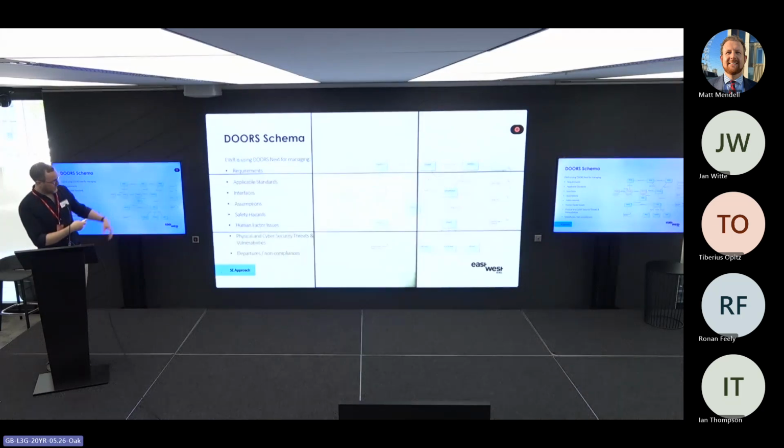And so part of the reason why it is important for me that we have the hazard stuff captured in DOORS is that we can begin to either refer to those standards and say, well, that's the standard that covers the hazard, or if it has a specific safety mitigation, we'll turn that into a requirement, and we'll put that in part of our requirement set that says, put handrails on all the stairs, and then through the V&V process, you'll be able to evidence that requirement is met, and then therefore it demonstrates that safety mitigation's been applied. So it is thought about.